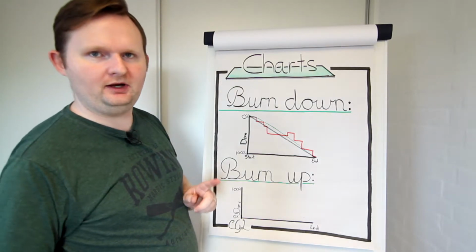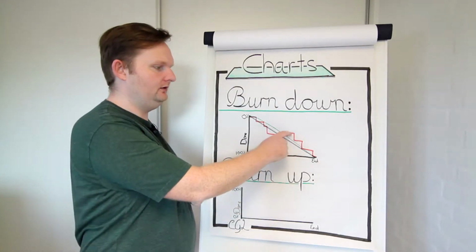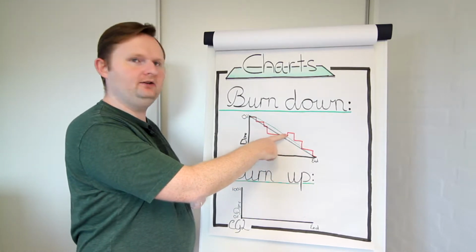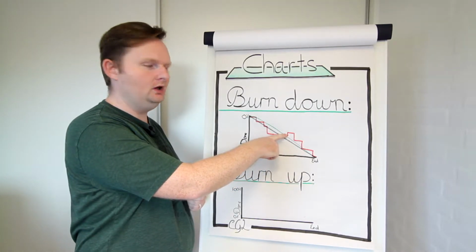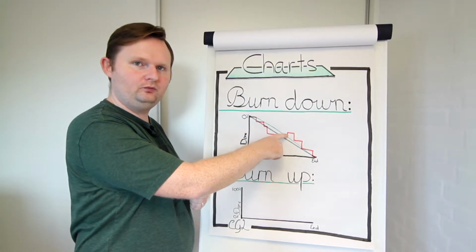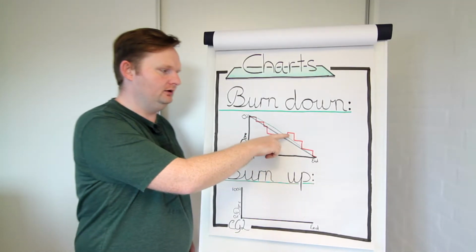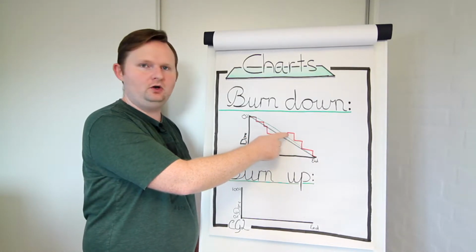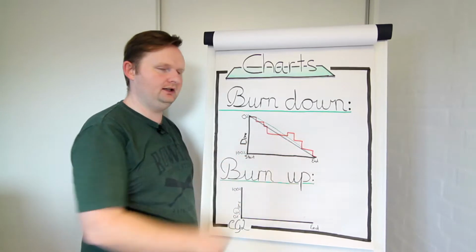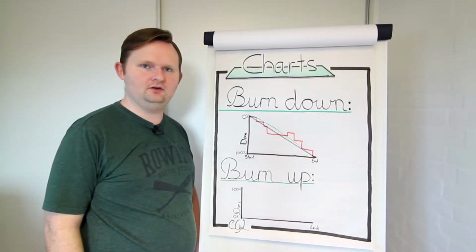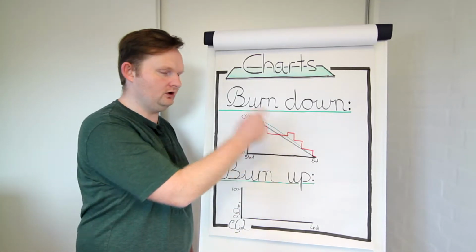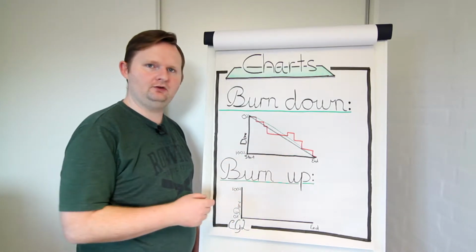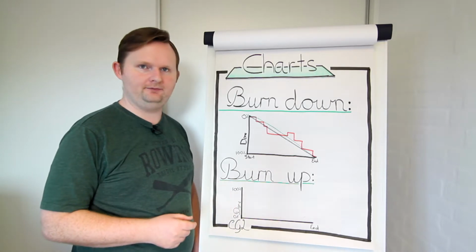And here comes the problem that I have with the burn down charts. It's this one. When I see this graph, I think we did minus work. But that's probably not the case. The case is often that something was added to the sprint or we got more knowledge, but that is not necessarily reflected in this chart. We can just look at it and think, oh, this is not what we wanted. And that is where I think the burn up charts are much better.